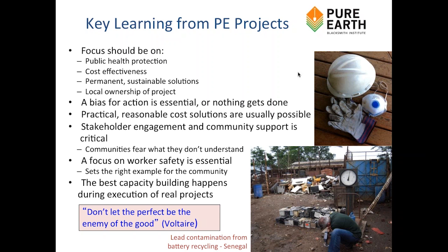In Zamfara, all the education was done door-to-door by public health nurses. I've generally found that the best people to do the public health education are people who know the local culture, local languages, and know how best to communicate things, and public health nurses are fantastic at doing that. So that was 100% of the people in all of those villages through door-to-door education in Zamfara.